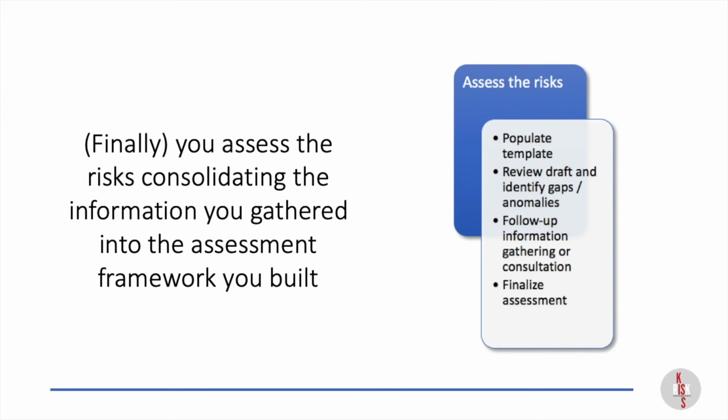Now, by finalizing the assessment, I still mean that there's some work to do, but essentially your assessment part is now complete. You should have a document that will give you all of the risks you've identified. They should all have some kind of rating or grading, and you should be able to put those in order from most severe to least severe, because that's what you're then going to use for decision making.